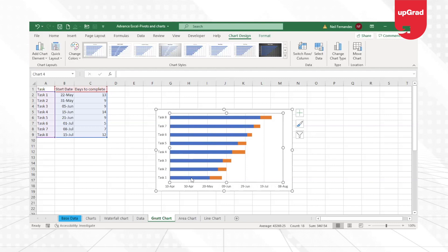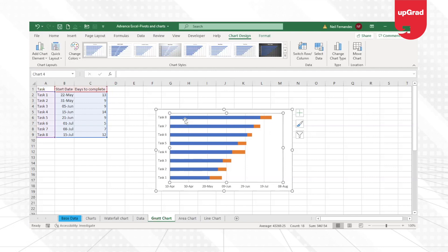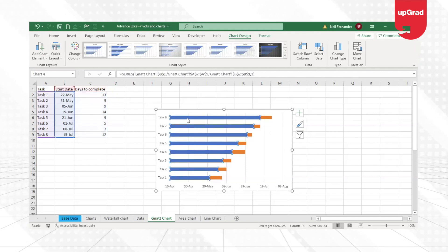Now what I'll do is I just want these small bars to be shown in the Gantt chart. I do not want the other bar to be shown. So I'll select the other bar.